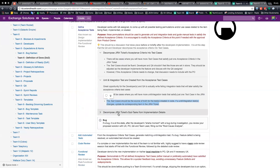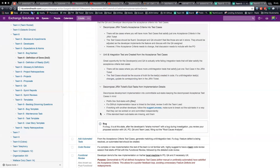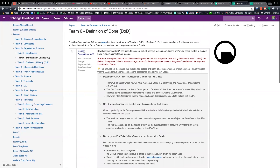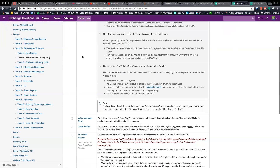Moving on: decompose JIRA ticket subtasks for implementation details. This is something that came from me working with Mike. When you start working on the ticket or soon thereafter, we need to decompose those subtasks. In the past we tried to do that during planning, but we haven't had enough time and we don't know enough about the ticket yet — we're not in the weeds yet and can't really create good implementation subtasks. I do feel it's important for the scrum master during planning or right after planning to add the default tasks we have. The default tasks are the subtasks that QA have, plus other subtasks like 'define acceptance tests.'